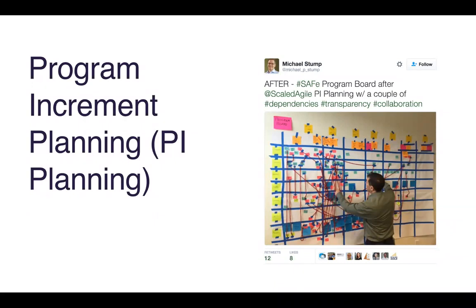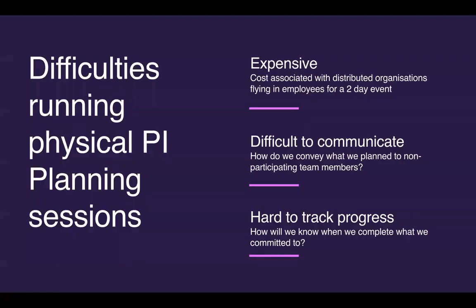Of course, there are challenges with running a physical PI planning session. Probably the most obvious is the expense. Ideally every member of the Agile Release Train — anywhere from 100 to 150 people — should be physically present in one location. You're flying that many people in, accommodating them for two or three days, and a PI planning session isn't just a one-time thing — it might happen four or five times a year. So it becomes quite a costly exercise.